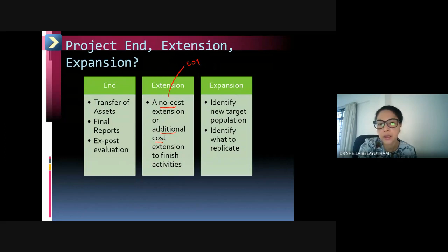However, if anything is related to yourself as a contractor, so you do not have sufficient funding to have sufficient equipment to assist you, that's why there is a delay, then probably the fault is on you. Then rather than that, you'll be given the LAD. Okay, so that will come with additional costs that you have to bear.